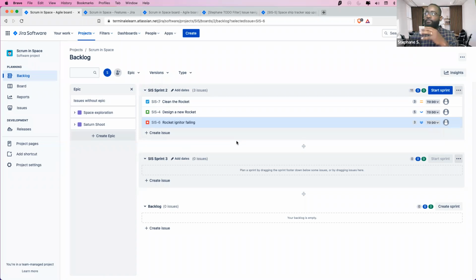For example, what is the capacity? It is how much you should be potentially able to accomplish. And the capacity is estimated in story points as well, because the story points that you're having on the stories, we're doing it for a reason, because it needs to match your capacity. For example, if your capacity is 2 glasses of water, and you have a story that is 3 glasses of water. If your measure is not points, but glasses of water, then you're going to be able to take stories up to 2 glasses of water, because that's your capacity.